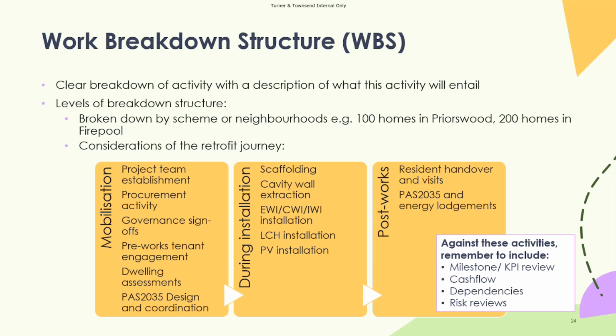And then lastly, you've got post work. So once you've done the installation, it doesn't end. You still have the resident handover and visits. You've still got the PAS 2035 and energy lodgements. And again, you can't carry out the installation before you've carried out the mobilization. Likewise, with the post-works, you can't carry them out before you've done the installation. So it's thinking about what the dependencies for each of these things are. So for example, I can't start my EWI work for a high-rise block of flats until I've done the scaffolding.